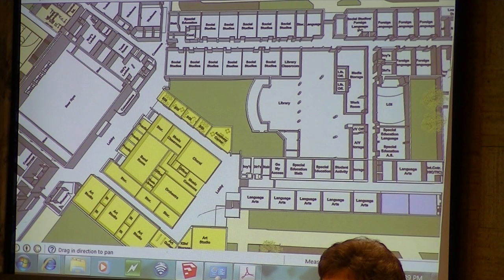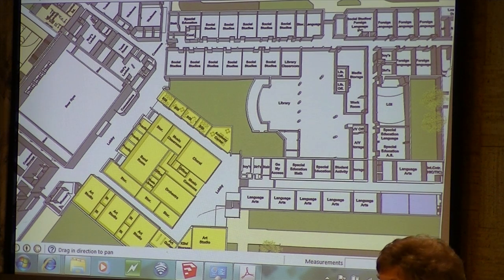Well, for the desired piece, but I think required, as I understand it, we need a new roof, we know we need new mechanicals, we know we need some space for the ninth graders, so there's some minimums you can almost rattle off. I think it would be important that as we design this, we achieve those requirements, so that we spend the dollars wisely and come out of this having met our required objectives. We may not get to some of the desired. So if it's windows in a courtyard, well, that would be nice, and you can look out or go out and eat outside, but I don't know if I put that in the required category, as an example.